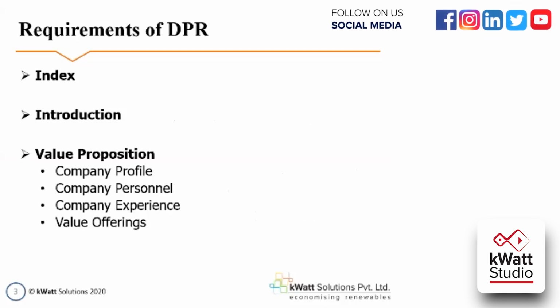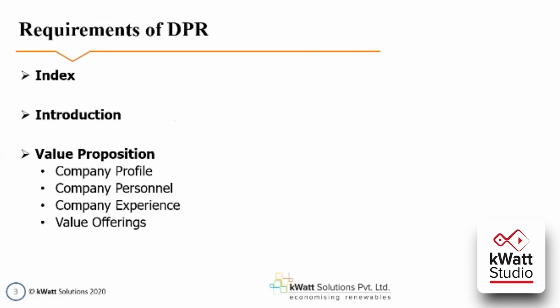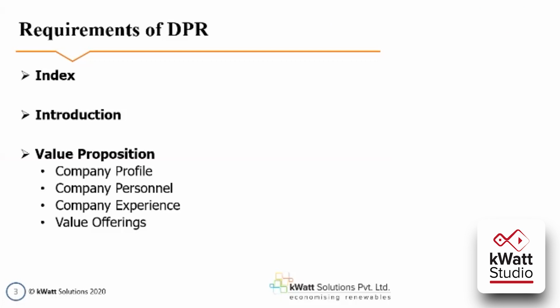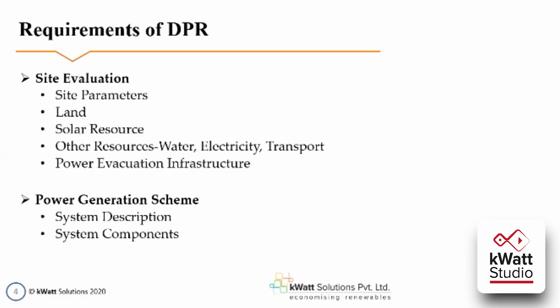So what are the requirements of DPR? That is, what should be added in your detailed project report file. The first thing is the index, then the introduction. Introduction means you can put your company profile and the offerings that you're going to offer in your project and the benefits that the customer will be getting after the installation of that project. So the value proposition will include company profile, company personnel, company experience, and the values to be offered. Then the site evaluation.